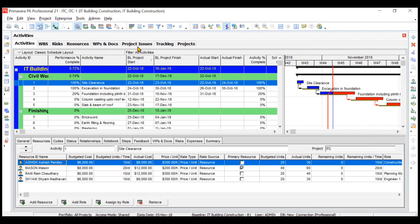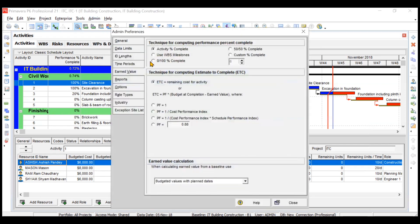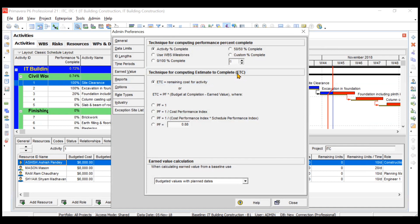But if you want to change the formula for this, you can very well do this by WBS milestone or maybe by 50-50 percent complete. By these techniques you can change the formula, but we will keep it same. Similarly, technique for computing the ETC. Right now, ETC is simply your remaining cost for the activity, but if you want to change the formula for this, you can change it.